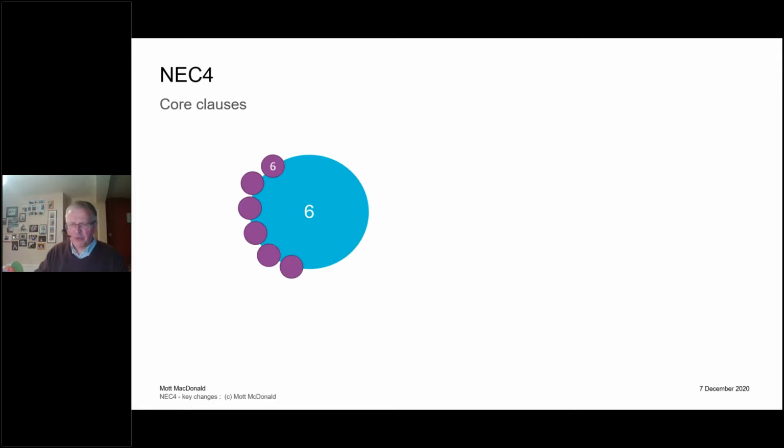The end of the question was, what if the client wants a certain subcontractor? Well, that's a dangerous thing. That's nothing to do with this presentation, but if the client wants to put any constraints or requirements on subcontracting, that would need to be in the scope. If the client wants the contractor to choose, for example, between 2 or 3 or however many more previously accepted, or what do we call them? Clients have a word for this. They have their sort of approved supplier list.